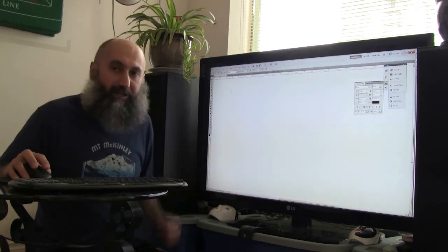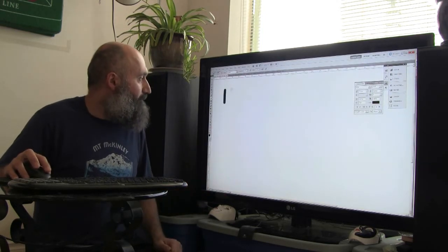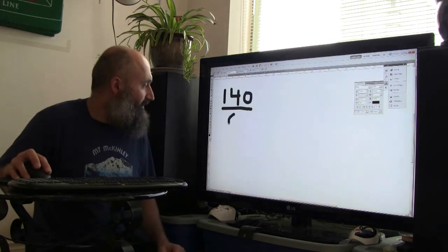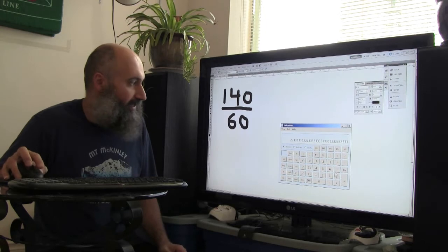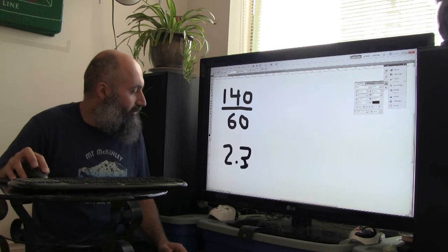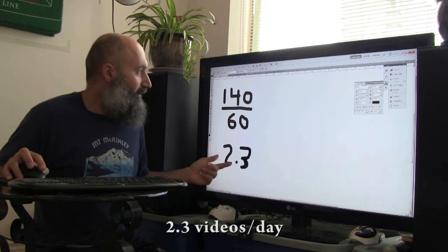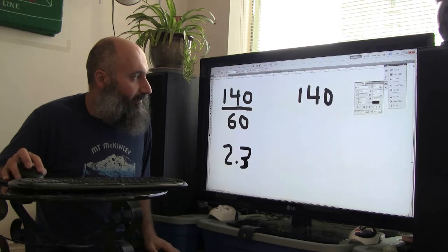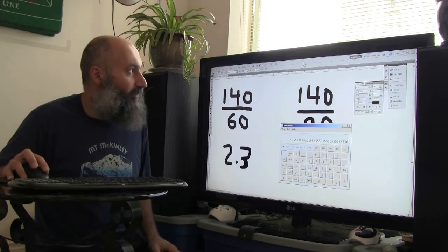Now there's 140 videos I needed to edit. So what you could do is go 140 and divide this by 60 days, and that's 2 months. So 140 divided by 60. Let's figure out what that is. That's 2.3. So if I wanted to get done in 2 months, I needed to edit 2.3 videos a day. On the long end of it, it was 140 divided by 90, 3 months. And that's 1.6